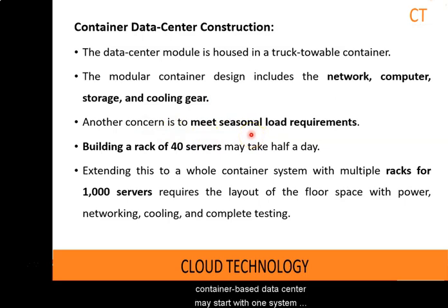The construction of a container based data center may start with one system, that is, one server, then move to a rack system design, and finally to a container system. The staged development may take different amounts of time and demand increasing cost. Building a rack of 40 servers may take half a day. Extending this to a whole container system with multiple racks for 1000 servers requires the layout for floor space with power, networking, cooling, and complete testing.